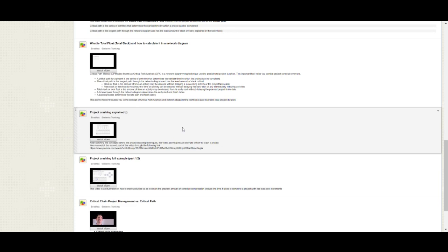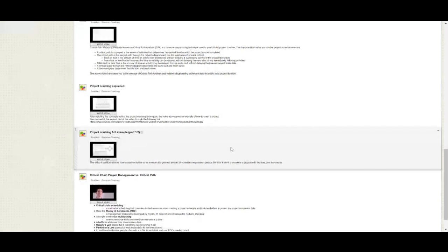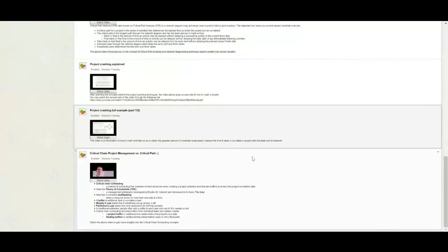And basically what you're saying is you're trying to compress the duration of the project. And one way that you can do that is you add more resources. So if it's programming, a computer program that you wanted to come up with, what you can do is hire more people to come in and do work. Okay, so that's adding the resources. Or you can use the same people that you have, make them work a longer time, so longer duration. So you have more overtime. So what you find is that you have to come up with a balance, because when you do the crashing, you're going to impact the cost of the project. Okay, so you need to make sure that you have a good balance of how much money you're going to use in terms of crashing, and make sure that you don't overblow the budget. Okay, so that is that.